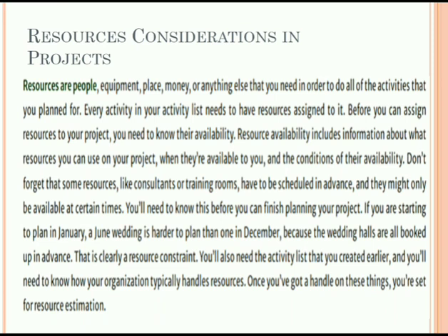When a particular activity is somewhat complex and you cannot get it completed as is, then you can break that activity down into a number of pieces. After that you can have the list of resources for every piece, and you can combine all the pieces and get what is actually needed here. It is a process of estimating individual activity resource needs or costs, and then adding these different things together to come up with the total estimation.